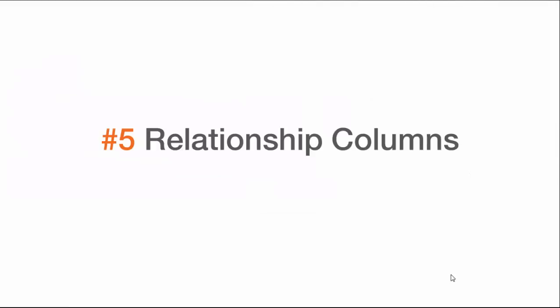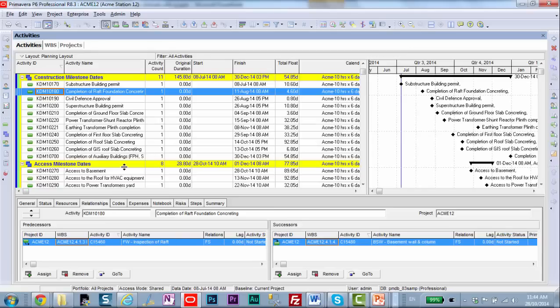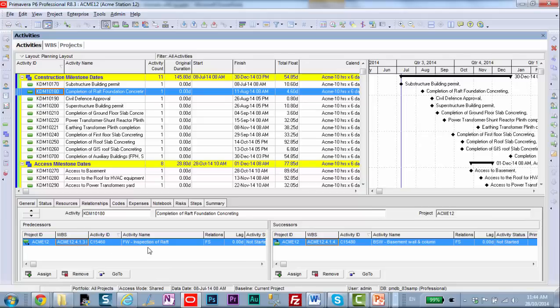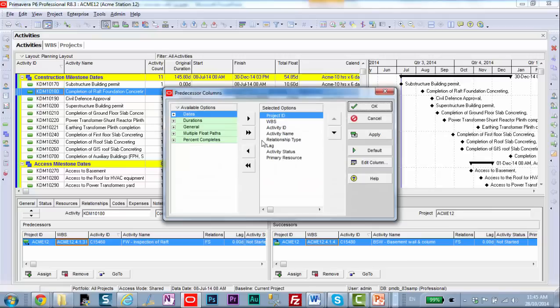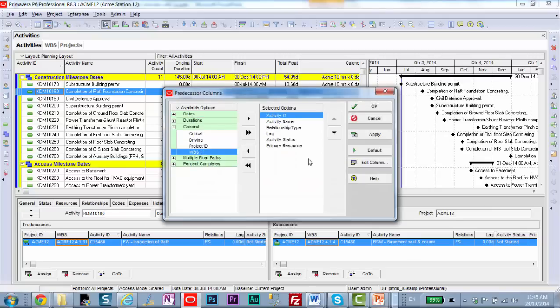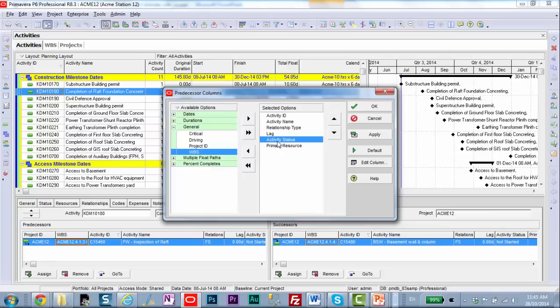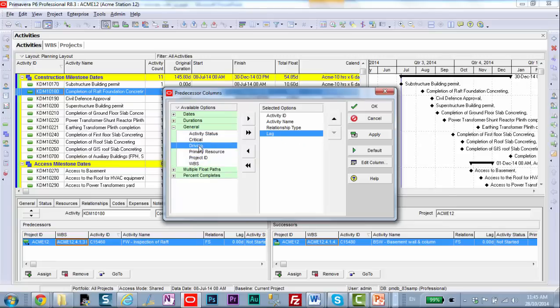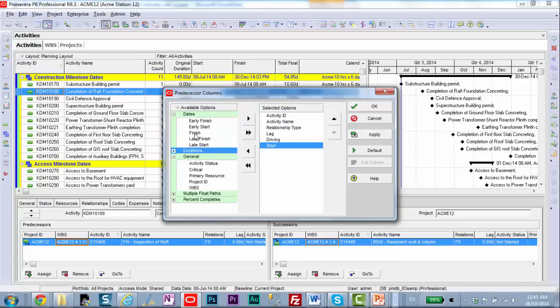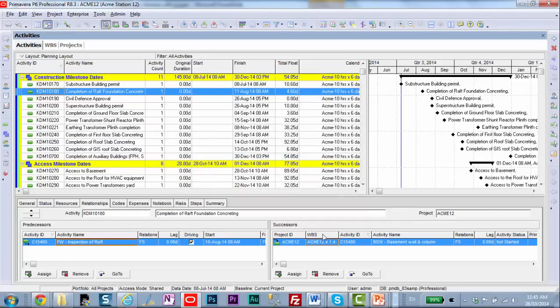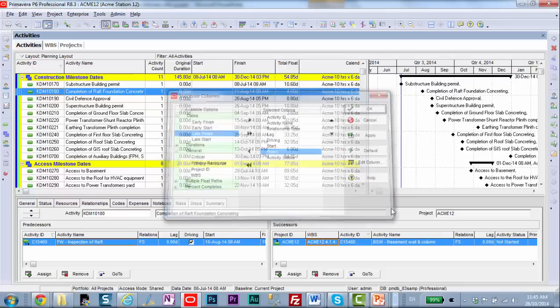The last thing about critical path analysis that I wish I knew was relationship columns. Let's go have a look in P6. We're looking at some of the construction milestones up at the top of the project. And we're looking at this completion of raft foundation concreting milestone. It has a predecessor and a successor. But what I can't tell from this view is anything about whether the date of this finished milestone is actually affecting the date of the successor, the basement wall and column. Right click on any column, customize the columns. Let's get rid of ID, WBS, we don't need those. Activity status, I'm not interested right now. Driving, we want to add that guy in, as well as we want to add start and finish dates. Click OK on that. On the right hand side we want to do the same thing. Click Apply.